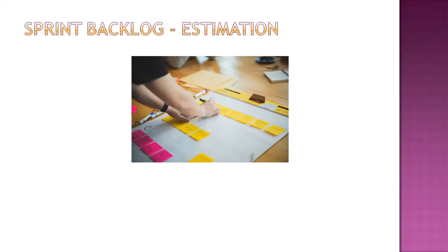Okay, so that also comes under the estimation of sprint backlog, because in tasks, we will segregate them in such a way that a task generally should not flow beyond a day. That means it should be restricted to like 8 hours or 5 hours, whatever the timeline can be. In very specific situations, we need to create tasks that cut across 2 days, because they cannot give any kind of logical value within a day, so we are extending the time. That can be a very exceptional scenario. Otherwise, generally, we should create subtasks in a way that they get completed in a day.